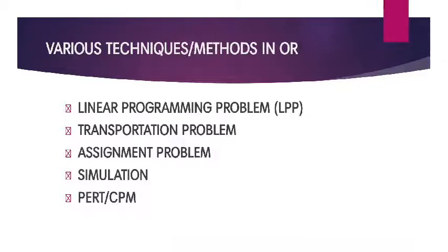The next method is PERT or CPM. Basically, PERT and CPM represent one and the same technique. PERT assumes that for each activity, the duration, that is activity time, is a random variable, whereas CPM uses known fixed activity timings. The planning phase leads to the construction of a network that represents the activities.